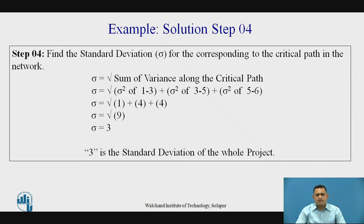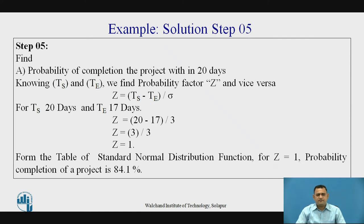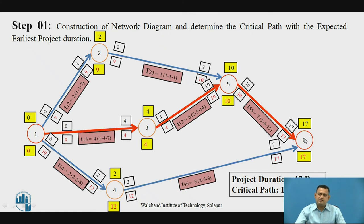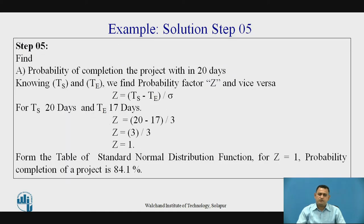We now have the variance and standard deviation for the project, which are needed for determining the probability completion time or scheduled completion time. Step 5: finding the answers. The first question asks for the probability of completion within 20 days. The project duration is 17 days, as seen in the network diagram. Using the normal deviate formula Z = (Ts - Te) / sigma, we can find the value.